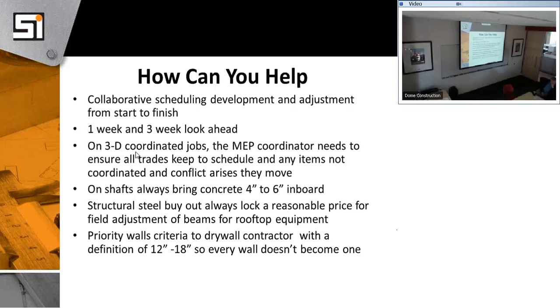So if in the beginning of the project you spend that extra effort to really sit down in what we call the big room, a room like this, and everybody looks at the job and says, hey, add more detail to the schedule, that's the way you can look for efficiencies. Like, if you're going to have a guy out there doing this work, then maybe we can share a lift. If I know that, the whole job is more efficient for all the crews, which will help them and help you be more efficient.